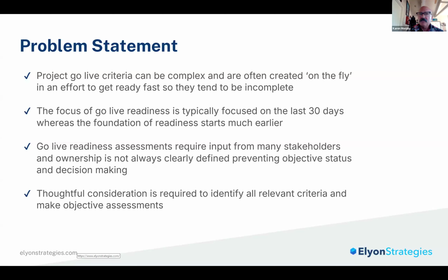Maybe you need to ensure that 95% of your users completed their training for the system and passed a knowledge check before they get handed the keys to use it. Maybe that's an important criteria.